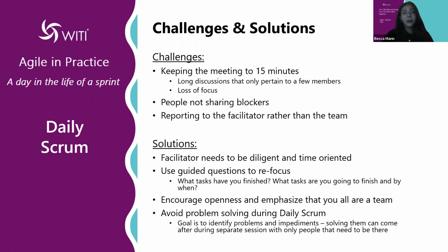Yeah, and me responding in the chat, I'm a little biased because I love estimating via complexity, because I think that every developer is a little different, right? So the amount of work that a senior developer could get done in 5 hours is very different than the amount of work that a junior developer could get done in 5 hours. So I lean a little more towards that. I gave a bit more of a biased answer in the chat, but there are very big pros and cons to estimating in every way that Mica just mentioned. But I think that's a good topic because it seems like it's a pretty hot topic in the chat.